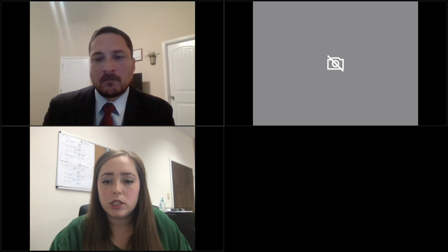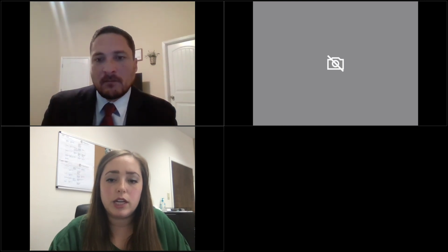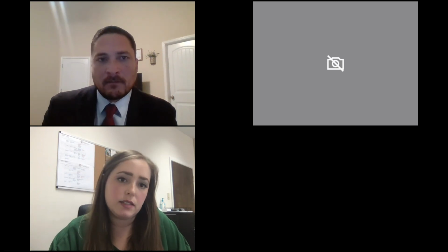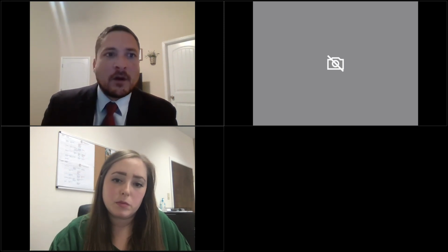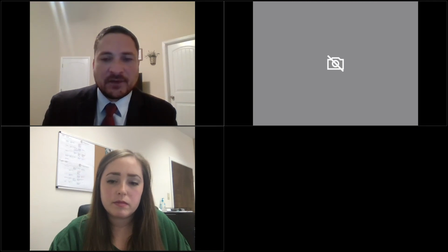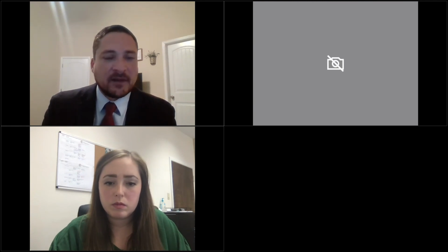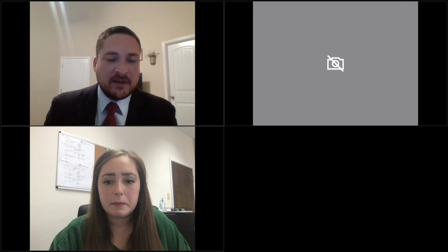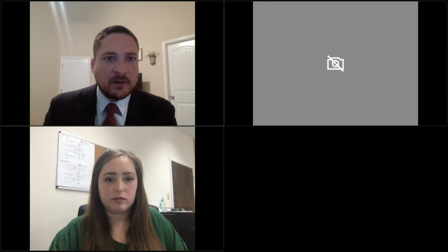So we've got one more question here. They're asking, do change orders have to be paid in advance? No, they do not have to be paid in advance. Generally, they're not paid in advance. Again, they become a part of the contract. So it really depends on the payment terms that you agreed to.